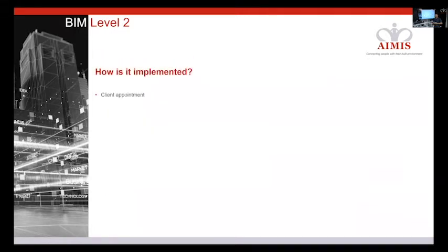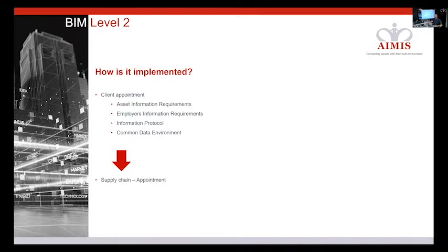That then moves on when the appointment is made. So we would start then with the client appointment. They would then reissue their asset information requirements, employers information requirements, the protocol, and establish a common data environment for sharing amongst their team during project delivery.